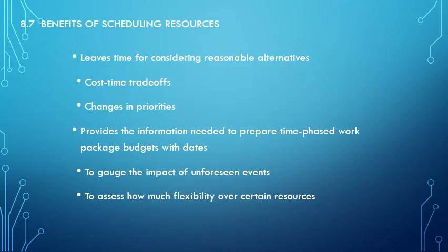Benefits of scheduling resources. So why are we scheduling our resources when we're talking about these things? It leaves time for considering reasonable alternatives. If the machinery or the people are not available during the specific period of time, maybe we change how things are happening or who's doing it or what kind of machinery it's going to be done on. We're going to look at our cost and time trade-offs. Do we have extra time in a certain area and then we can reduce our costs, or are we short on time and we're going to have to pay additional costs for overtime or extra people?